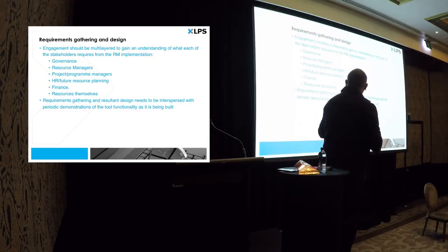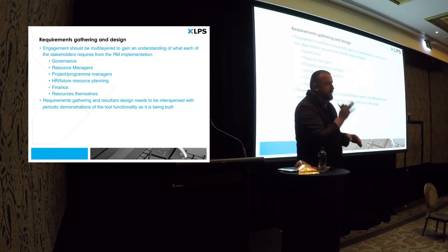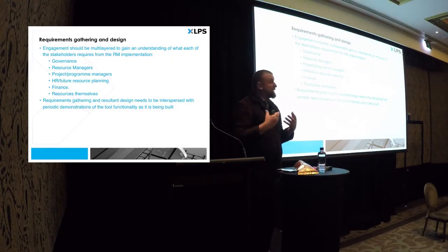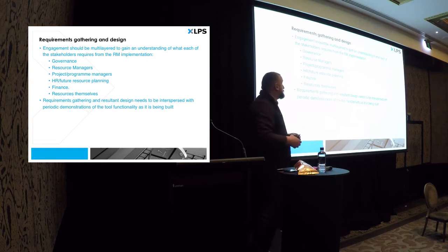That's a key thing that's come through a lot of the presentations around Agile over the last couple of days. So we've found it really beneficial to have short, sharp sprints of development or configuration of the tool, take it back to the key stakeholders, show them how it's working, and give them a chance to play in it to ensure that what they're getting will serve their purpose, both functionally and from a process point of view. Common sense, but it's really been in stark relief over this engagement we've worked on recently.